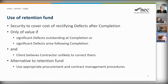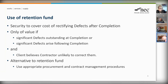Whatever you ask for by way of a retention fund or any other security, there is a cost involved. The contractor must make some allowance for the cost of providing this fund to the client — there's a cash flow problem; they have to borrow money from somewhere. If you can make appropriate procurement arrangements choosing a contractor who's likely to want to finish the work, make sure your contract clearly specifies what you want in the scope for completion, and you manage contract quality procedures well, there's a question mark as to whether you really need a retention fund at all.